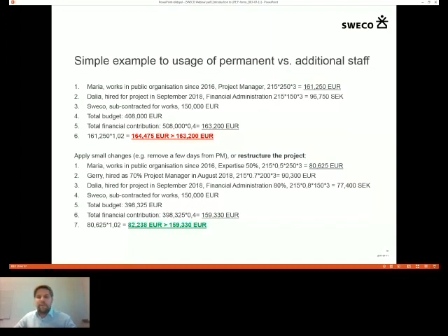And the costs for these are 150 for junior, 200 for senior, and 250 for project manager. If the projected or the targeted existing salaries are similar to this, this would be enough. It's of course hard to specify the exact amount of the salary, which will be in 5 years, for example.